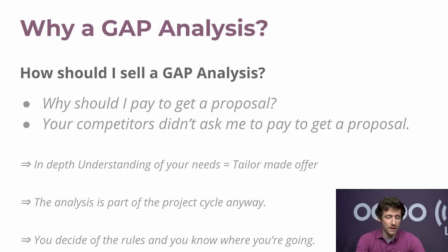Also, another aspect that you have to understand, Mr. Client, is that this pre-analysis is actually part of a project. Usually in a project, you have the same recurrent phases: the first one is the pre-analysis, of course, and then we have the analysis, and then of course the development phase and implementation phase. My competitors are actually suggesting that you pay before the pre-analysis phase, not allowing you to understand where you are going and not perfectly understand what you're going for. While I'm actually proposing that you pay after this first pre-analysis, allowing you to know exactly what you're signing for.